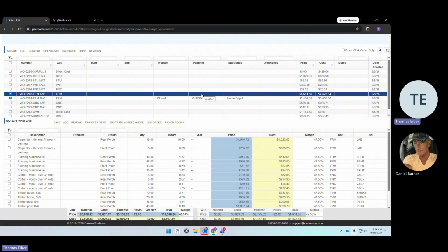So if they're doing stucco and paint and framing and concrete, I'm just naming all the trades that are right in front of me, you would add up all of those cost columns, give them the scope of work, and if they can do it, then we can allocate that money for them to do this job. That SCA is required in order to progress, in order for us to do what's called an RFP, something we'll learn about later, but it's a request for payment. Obviously, a subcontractor getting started on a job would want a down payment, especially if they're purchasing materials. Your ability to pay them is dependent on your ability to create that subcontractor agreement and voucher what's necessary to give them their money.